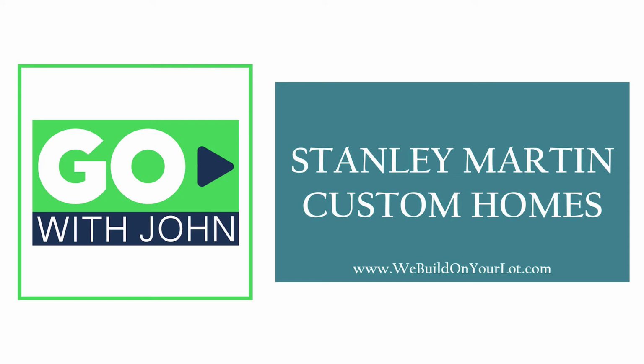All right, welcome back. We're here with Tim Brassfield, Pat Kearns, and Michael Schnitzer, and we're talking about today new home orientation and warranty. So we spent the first segment talking about new home orientation. What happens after new home orientation, Pat? So the next step, obviously, is to get you to the settlement and to officially turn the home over to you. Like Tim said earlier, typically we're scheduling that new home orientation about a week before we anticipate settlement.